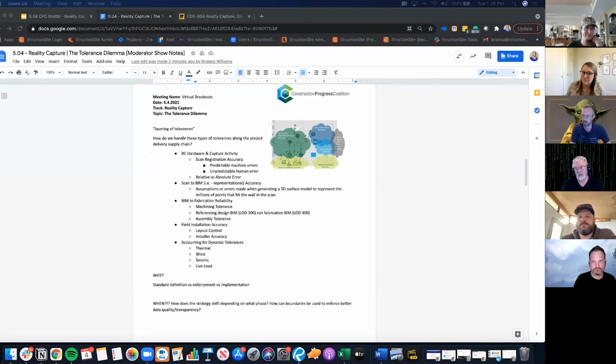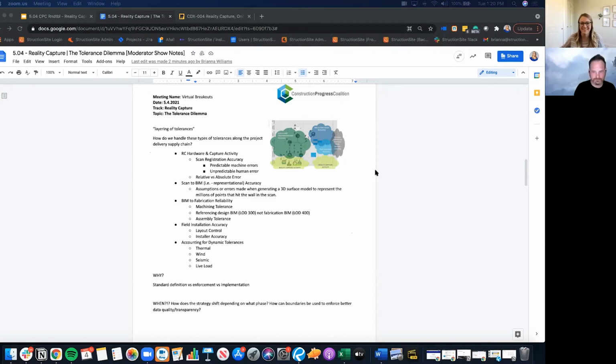To your point, what Dustin was saying, if you're doing a nuclear plant, or a clean room, it's more painful when you miss things. A standard commercial building, it's no big deal. We go cut it and move it again. But you're buying fittings that cost $2,000-$3,000 a piece. It's pretty painful when you miss things like that. Or if you're prefabbing an entire unit that's volumetric, you don't have the ability to go move the pipe.